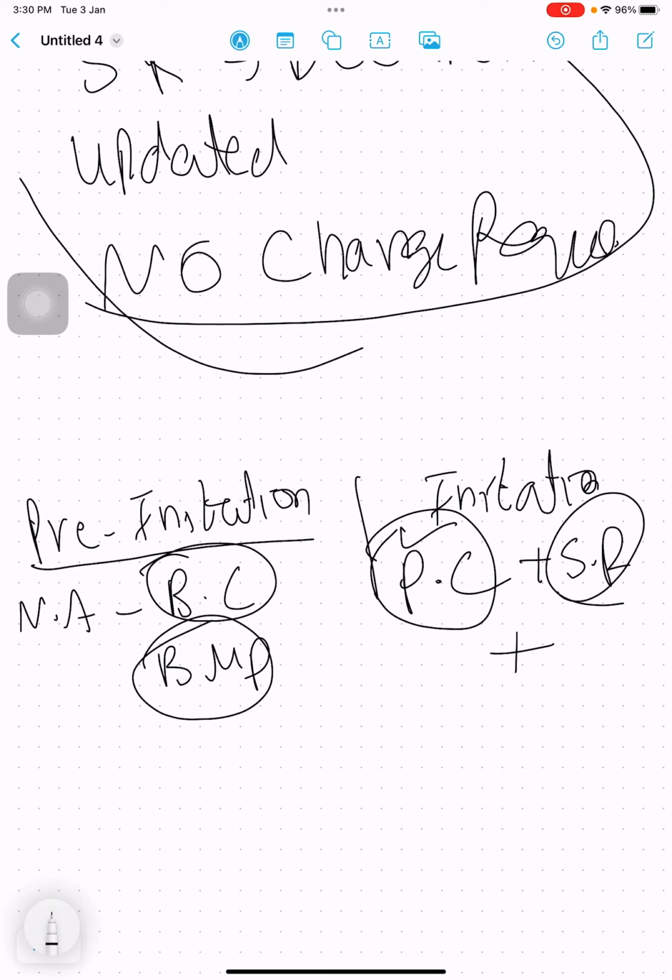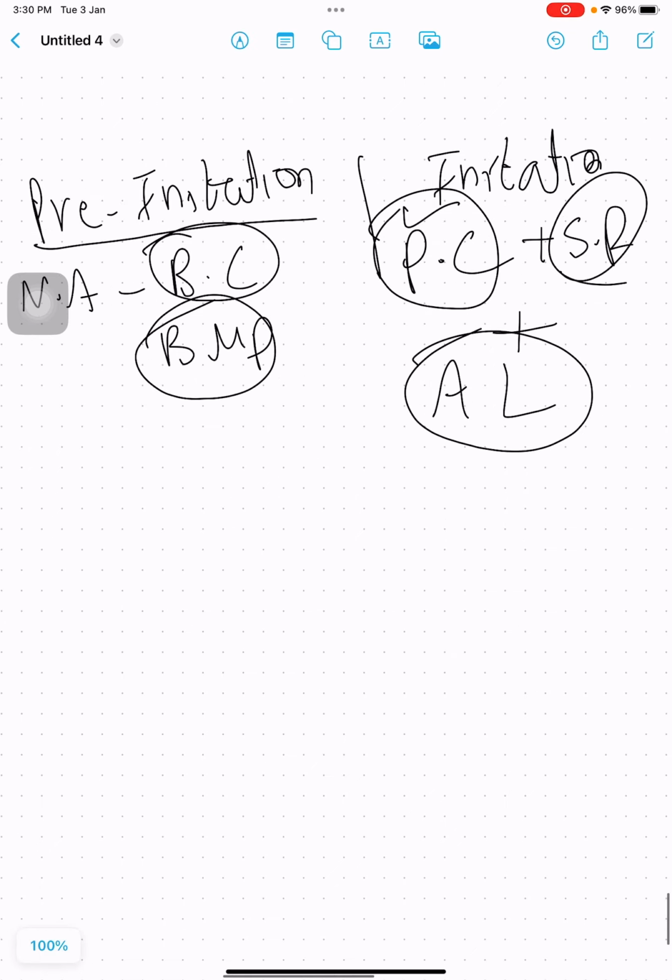In addition to that, sometimes you also make an assumption log with it. Assumption log is nothing but a list of all the assumptions that we must have throughout the project. Like assumption number one can be that the project manager will stay in the project, when it was added, when it was updated, what is the current status. Assumption log is important because it becomes the most important entry into the risk register.